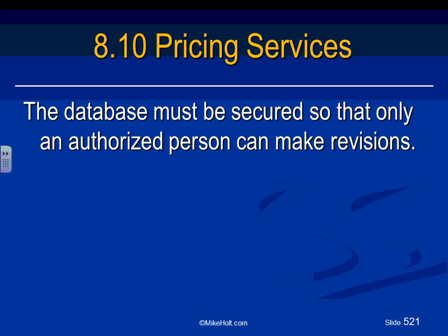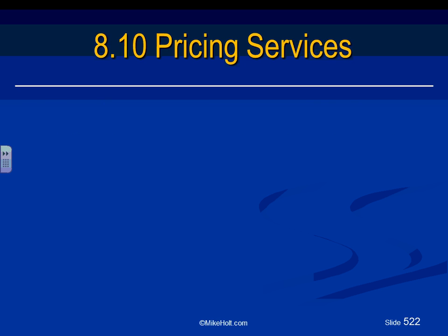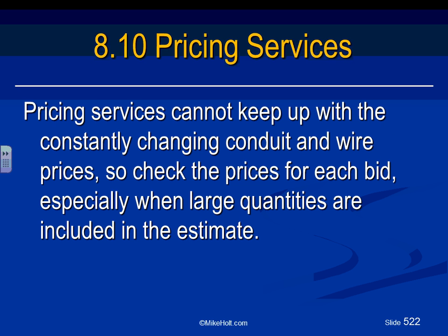You can add your own assembly, but you cannot go and edit the database. The challenge, guys, is I walk in, I say, well, based on my experience, I think we should get rid of this, not knowing that this could be used somewhere else in the country. So only authorized people should edit the database, which is basically your labor and material.